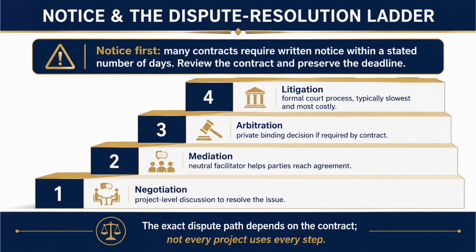Notice, and the dispute resolution ladder. Two concepts on this slide, and the first one can make or break a claim before it even starts. Notice first. Many contracts require written notice within a stated number of days. Review the contract and preserve the deadline.